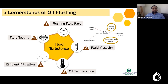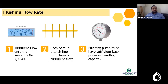The second cornerstone is fluid viscosity. Referring to the Reynolds number formula, dynamic viscosity is inversely proportional to Reynolds number. Therefore, the lower the fluid viscosity, the better the Reynolds number and the more efficient the flushing. The remaining three cornerstones are oil temperature, efficient filtration, and fluid testing.